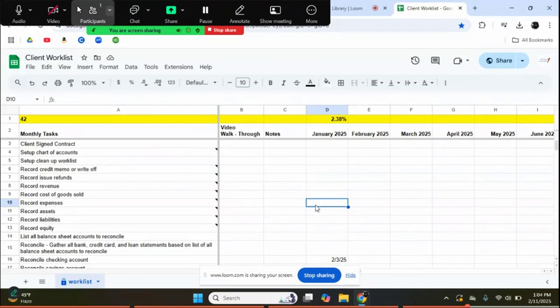Now, going forward in the future, you want to put a clause on your retainer packages saying that if the scope of work increases, the price may adjust. That way, if something happens in the future, you can always go back in and say, okay, we were not aware that these additional tasks were involved, so the price will change.